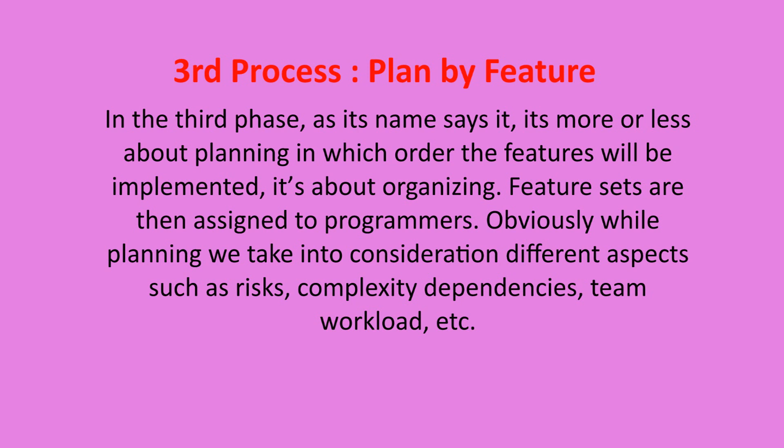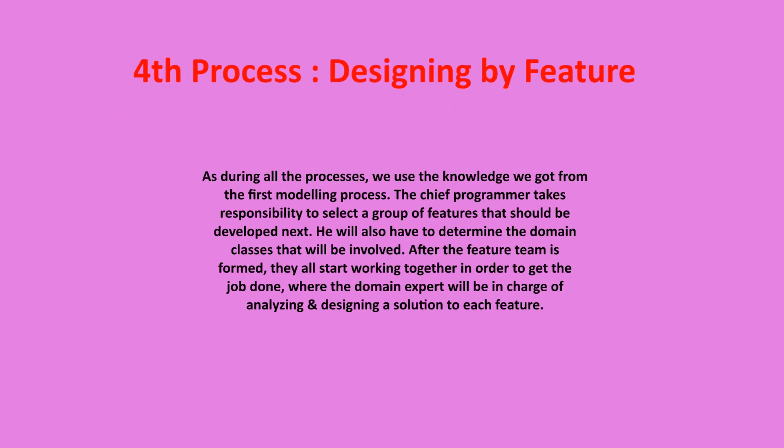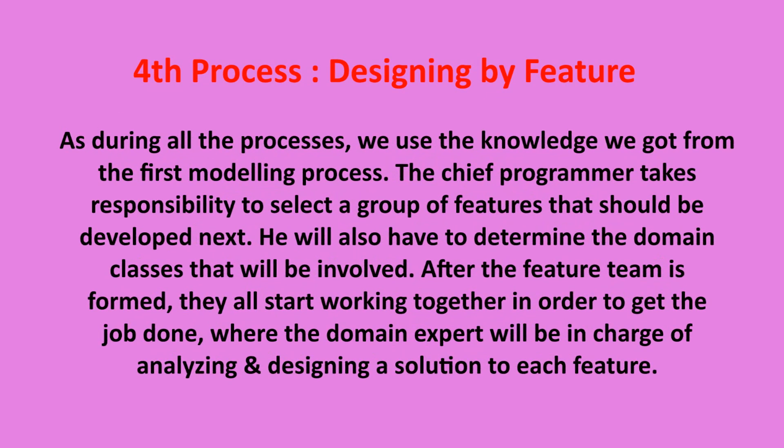The third process is plan by feature. As its name suggests, it is about planning in which order the features will be implemented. It is about organizing feature sets that are then assigned to programmers. While planning, different aspects are taken into consideration, such as risk, complexity, dependencies, and team workloads.